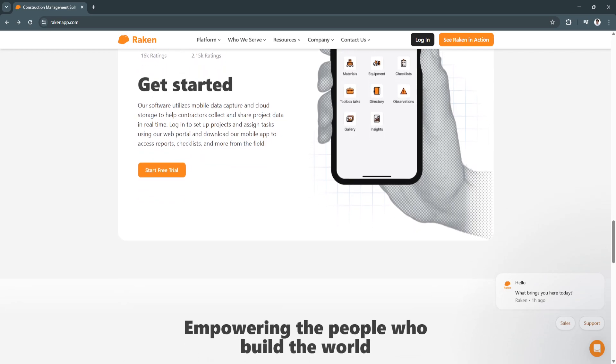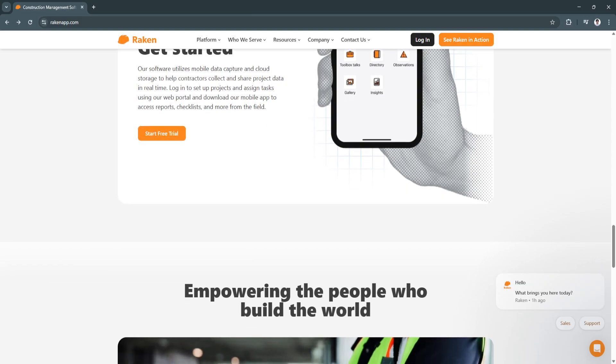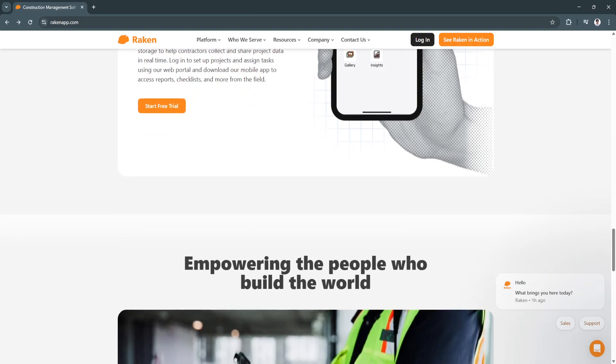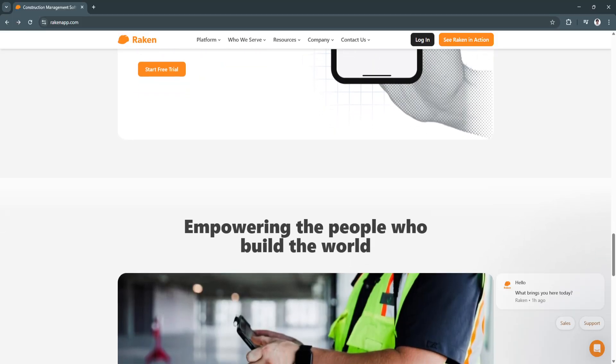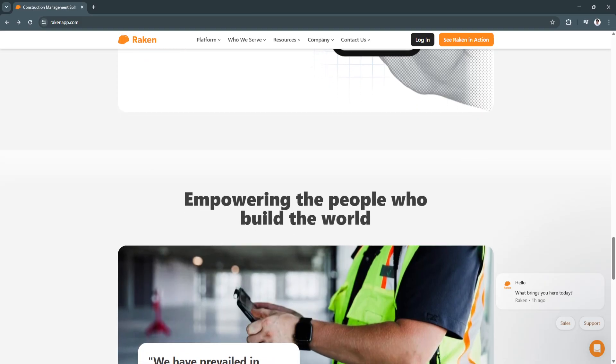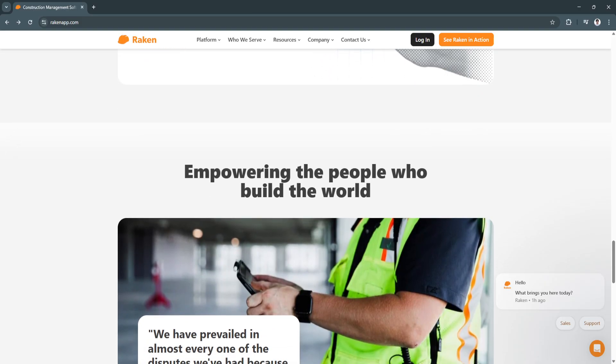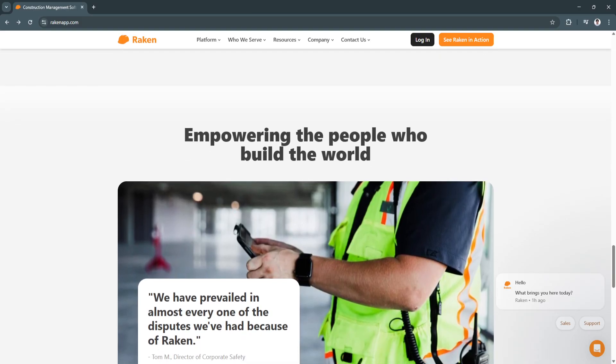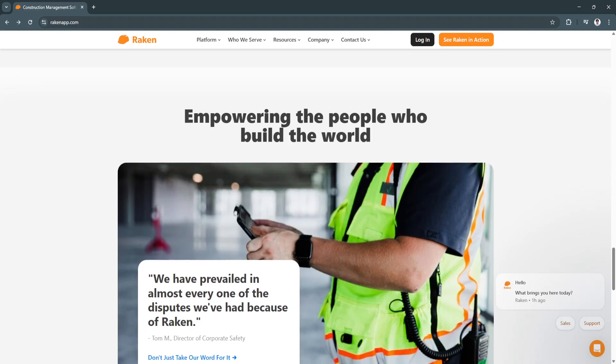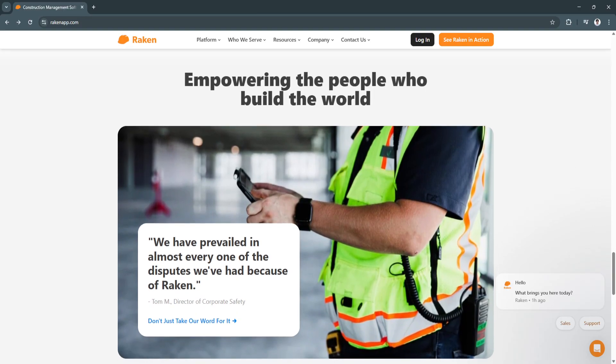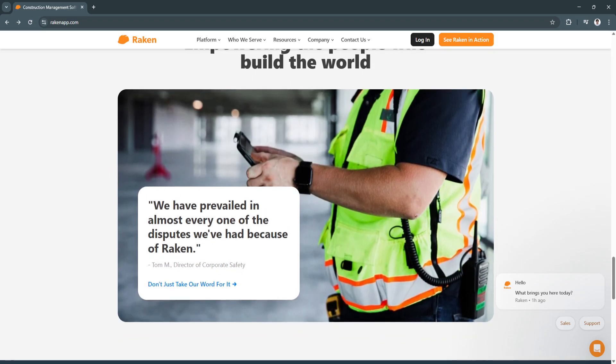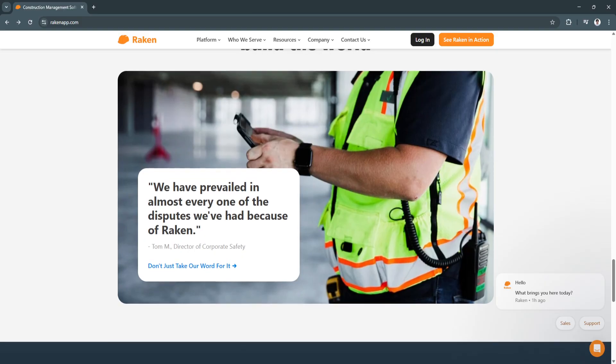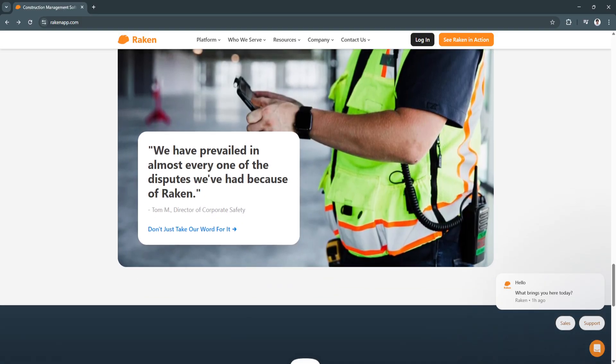Another key feature is photo and video documentation. Visual documentation is crucial in construction for tracking progress, resolving disputes, and maintaining accurate project records. Racken allows users to upload photos and videos directly into daily reports. This provides a visual record of work completed, reducing liability issues, and helps identify issues early to prevent costly rework.